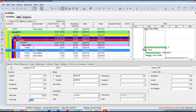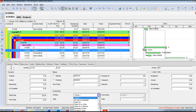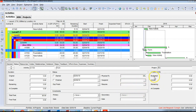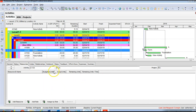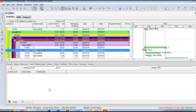Free float of zero means even a one-day delay will affect successor activities. So free float affects successor activities and total float affects the overall project. The Status tab also shows start and finish dates, any constraints, percent complete, and a suspend date if you need to pause and resume the activity. You'll also find budgeted, actual, and remaining duration and budget values. The Resources tab shows budget units, actual units, and remaining units — all visible when you update the project.